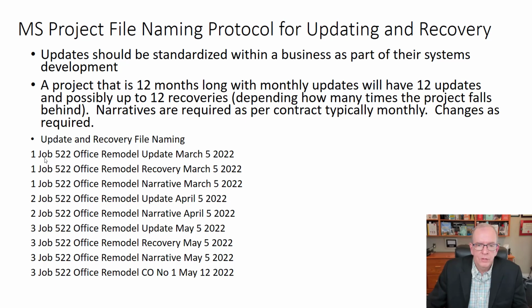Scrum is, well, in construction is just starting to get used, but it's been used in IT for a few decades, using agile methods. Lean construction, adopted from the lean manufacturing area, does a lot of short-term aspects with last planner system that feeds up into the master schedule, into the milestone schedule.